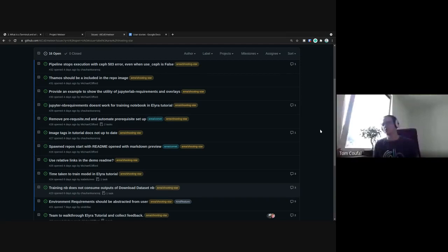I think, on the other hand, though, that these user stories, whatever we call them, should omit any technical details and should basically strip the technical side of things and be basically just an ideological guidance of what the project should deliver. So it's understandable for people like Daniel, who's not tracking our issue boards.